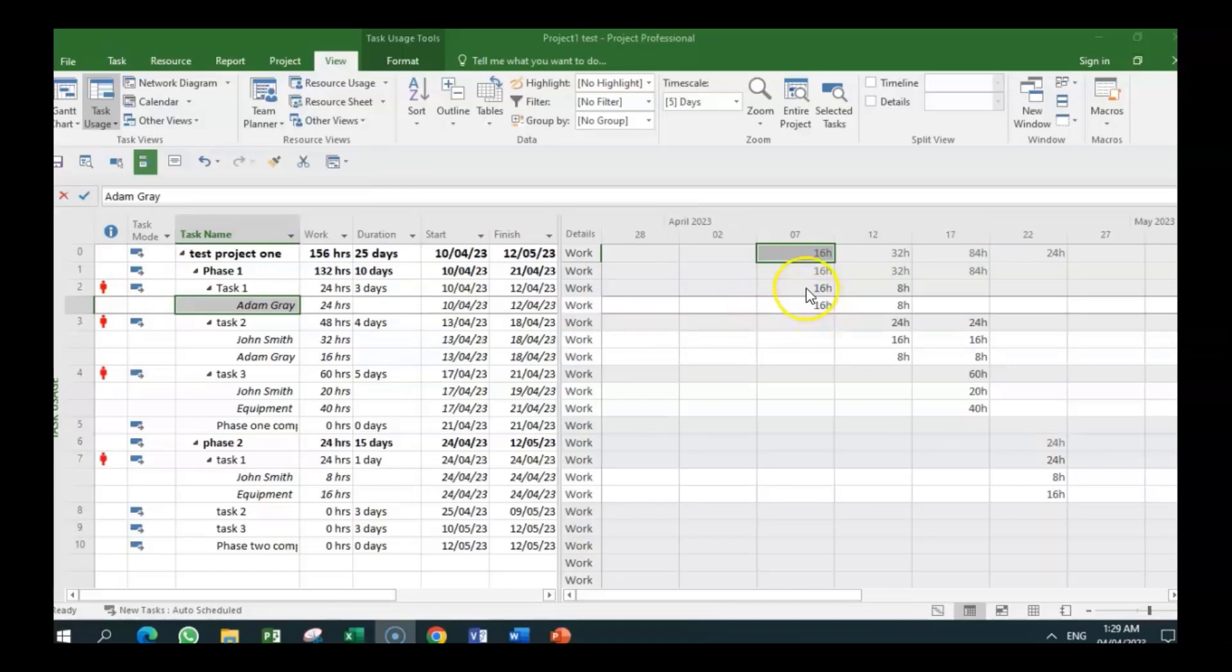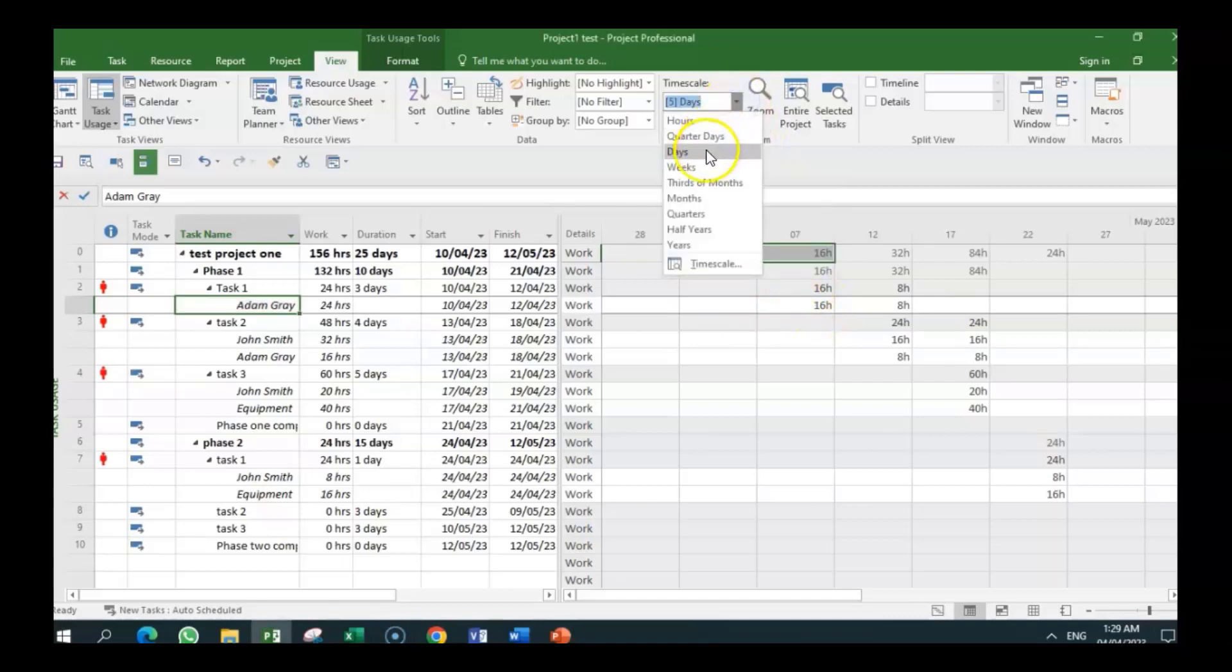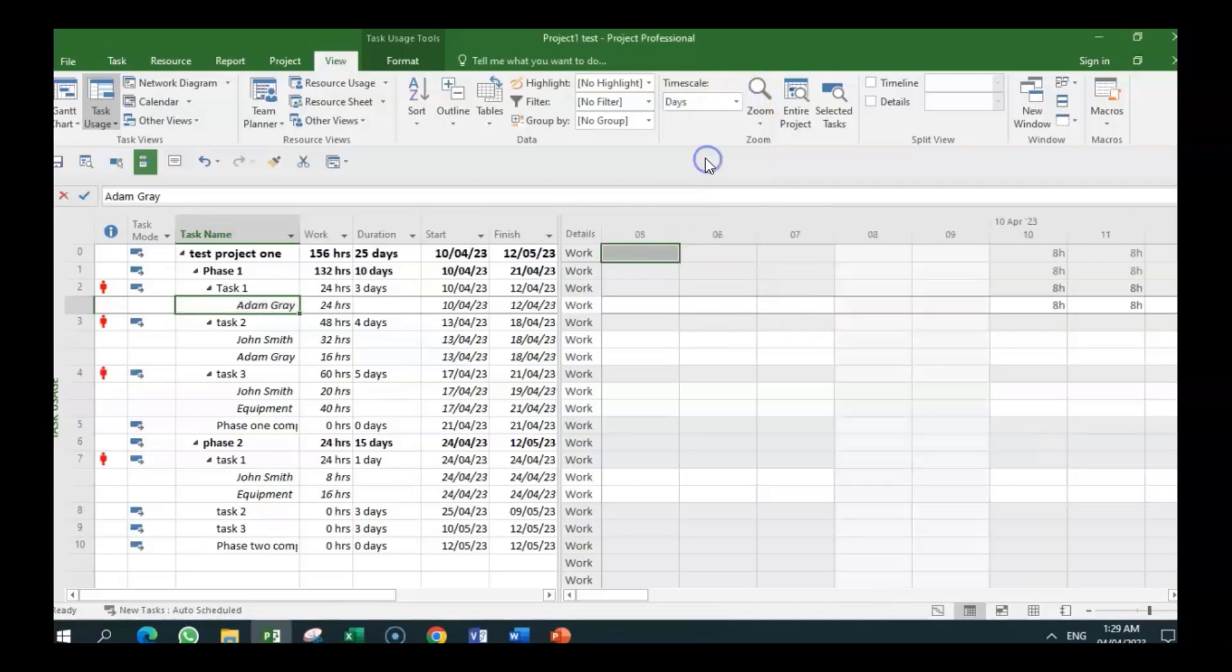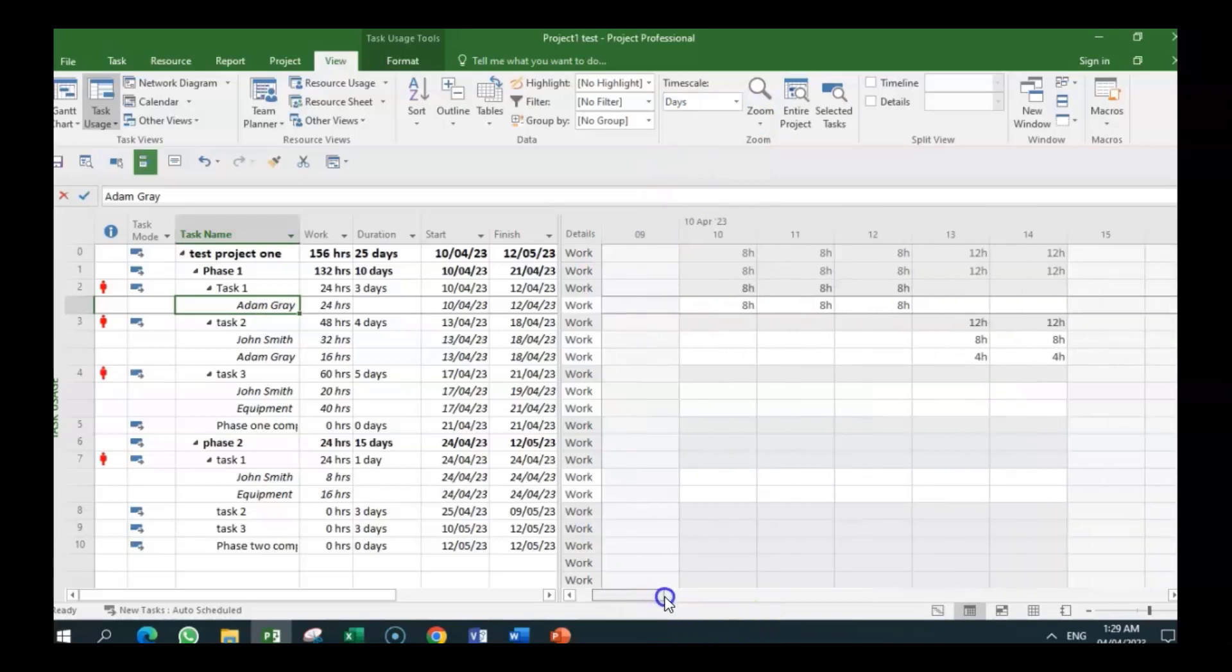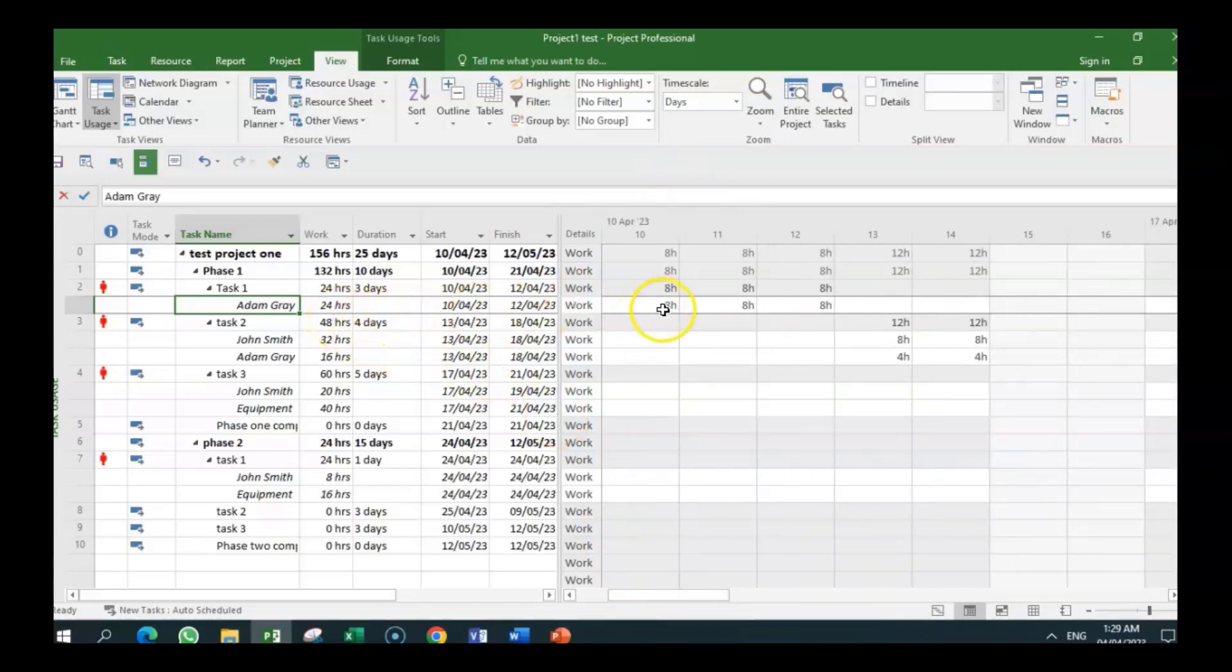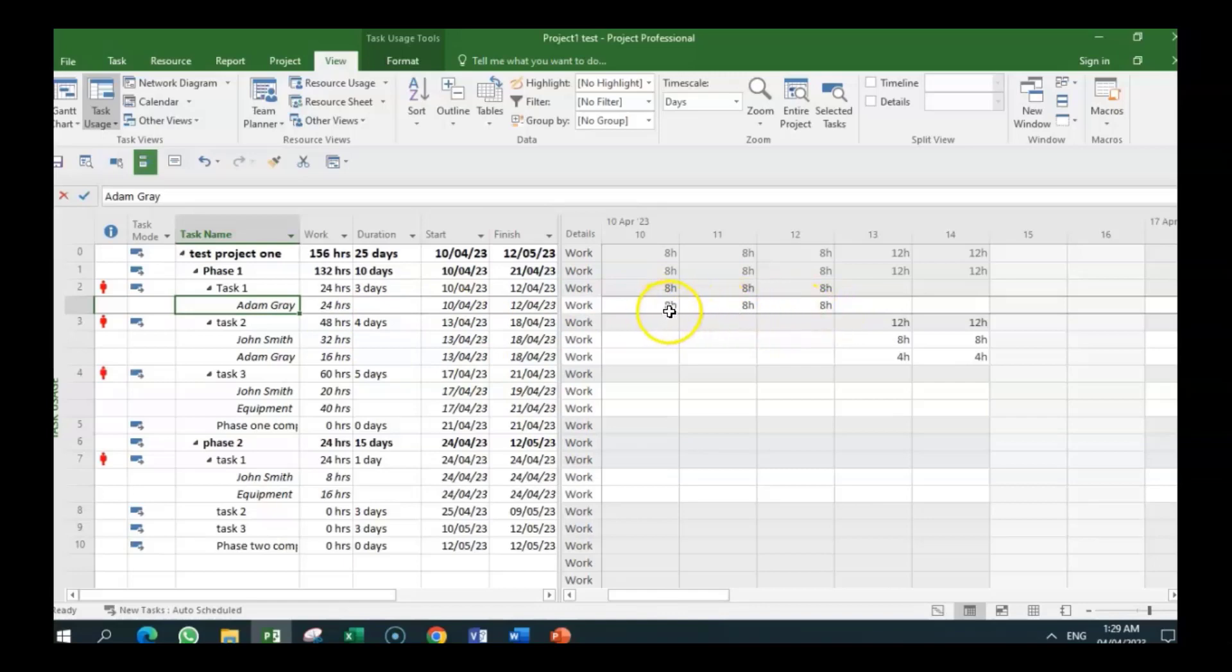Let me just—one of the things we could do is move from five days to two days, because we want to see what is the actual situation over time. And we have gotten days now. And we realize on the 10th, he's working eight hours; on the 11th, he's working eight hours; and on the 12th, he's working eight hours. So that is the 24 hours against his name.